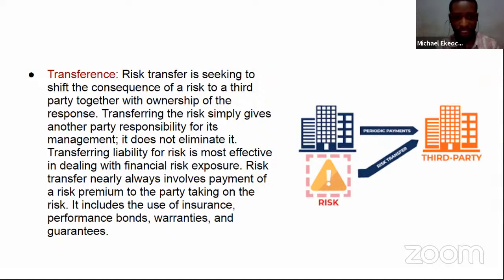Transferring the risk simply gives another party responsibility for its management. It does not eliminate it. It does not take away the possibility of that risk occurring. You're just shifting responsibility. So transferring liability for risk is most effective in dealing with financial risk exposure.